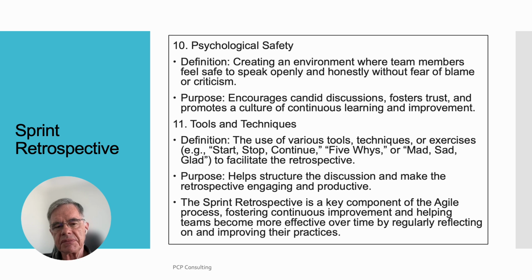Tools and techniques. Definition. The use of various tools, techniques, or exercises, for example, start, stop, continue, 5 whys, or mad, sad, glad to facilitate the retrospective. Purpose. Help structure the discussion and make the retrospective engaging and productive.